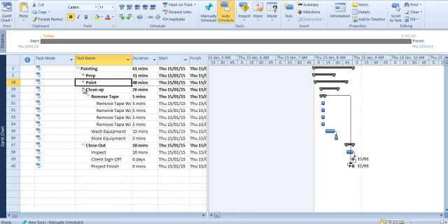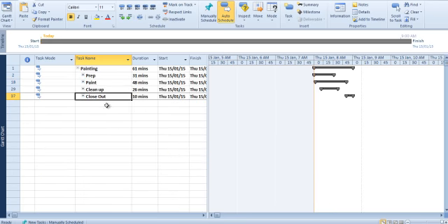Okay. So we've done a couple of things and we've saved a lot of time in our project. I think we started off at 370 minutes, now we've gone to 61 minutes, and in some cases we've taken a few things which may compromise quality, but we didn't need to. Just by changing the relationships and how things were scheduled, we actually find that we can save a lot of time in our projects.